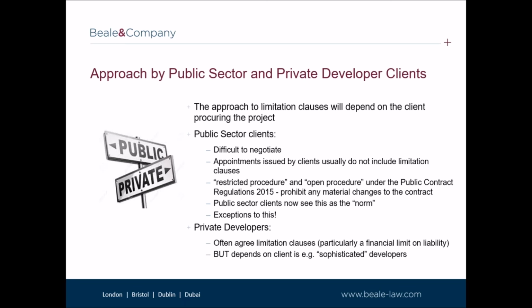Nevertheless, there are exceptions to this position, and in some cases, consultants are able to negotiate contracts even though they are subject to the open or restricted procedure. Where another procedure under the regulations is used, such as the competitive dialogue or negotiated procurements, or the regulations do not apply, of course limits of liability can be negotiated into appointments.